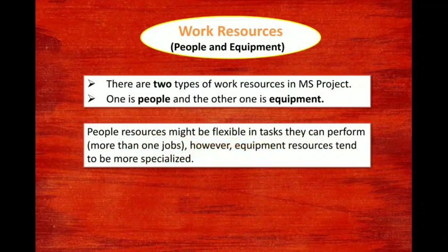Now suppose, for example, you consider the head mason. He can be part of all the works if they proceed simultaneously, but how you allocate the time for that particular resource is very important. If the activities have a start-to-start relationship, and the subcontractor or labor head mason is working for both activities, you cannot show both of them at the same time.